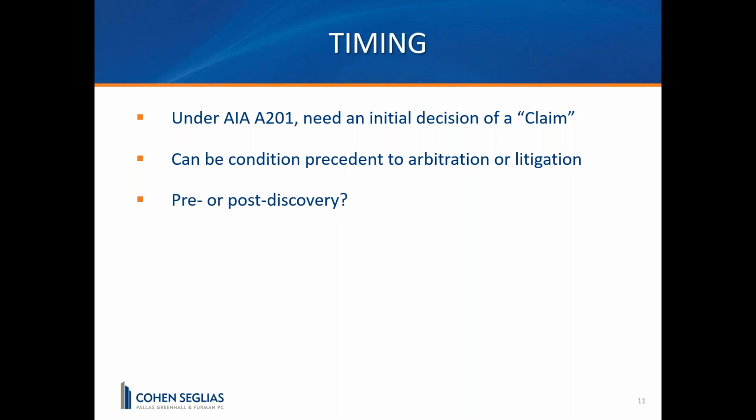So if this is the case, or you already know the tenor of the discussions surrounding the dispute thus far, that an early resolution is going to be out of the question, you can always suggest that the parties either waive mediation as a condition precedent or postpone the mediation until it makes more sense, meaning that you take some discovery, maybe some depositions of some key project people, exchange some documentation, so you can get better up to speed on the positions of the parties.